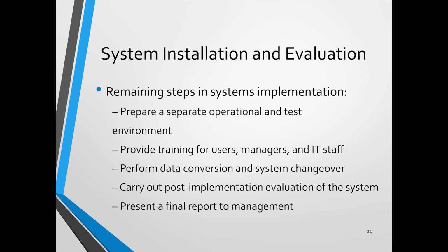And do things like this until you finish. When you convert the data, it's not just one table, it may be hundreds of tables. Some tables are constant, you can just download to your computer and then upload to the new system straight away, while some of the data is dynamic, so you also have to clean the data first.